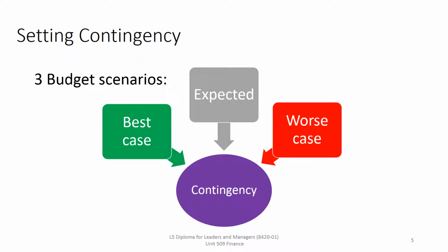So it isn't always that straightforward, and there are many requirements for contingency in different areas and in different ways, and there are methods that have been developed to quantify the uncertainty and measure the contingency that needs to be put in reserve as a cost estimate. Different methods have been developed, and there's different calculation for costing contingency, and there's a range from simply applying a predetermined percentage of a total budget or a total cost of a project, which your organisation may have set, and we'll talk about that in a second, to complex mathematical and statistical methods.